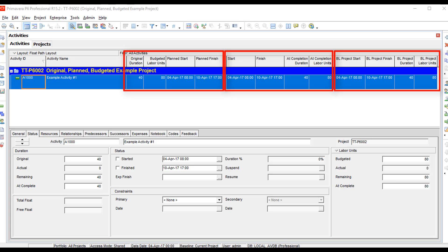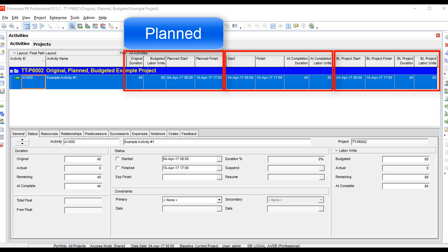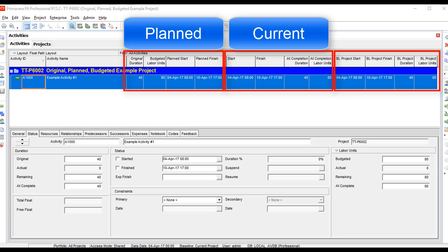The most important thing to understand is to keep these fields separated into the three groups. The first group is basically your planned data — original duration, budgeted labor units, plan start, and plan finish. Those are the fields you can edit while building a plan. The second group — start, finish, at completion duration, and at completion labor units — are your at-completion hours, durations, and dates.